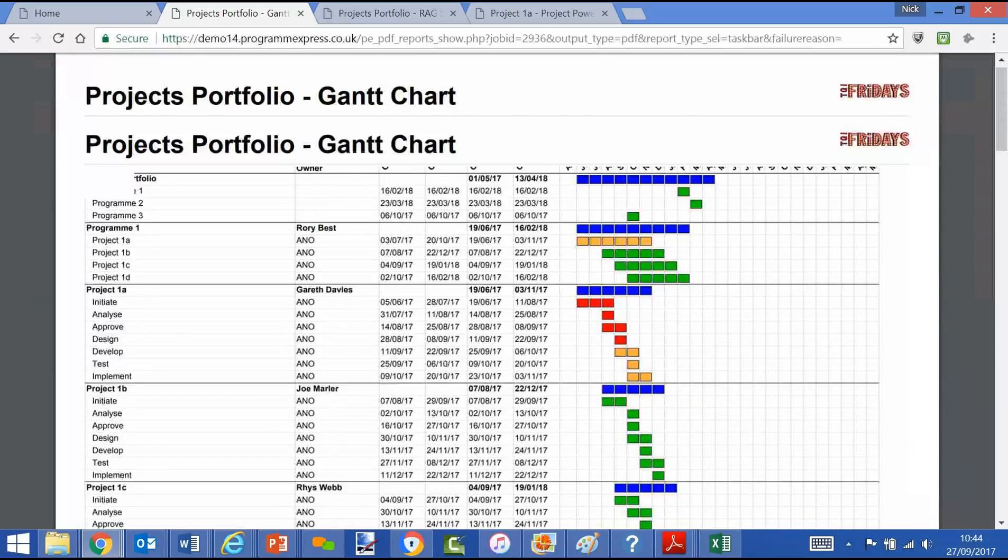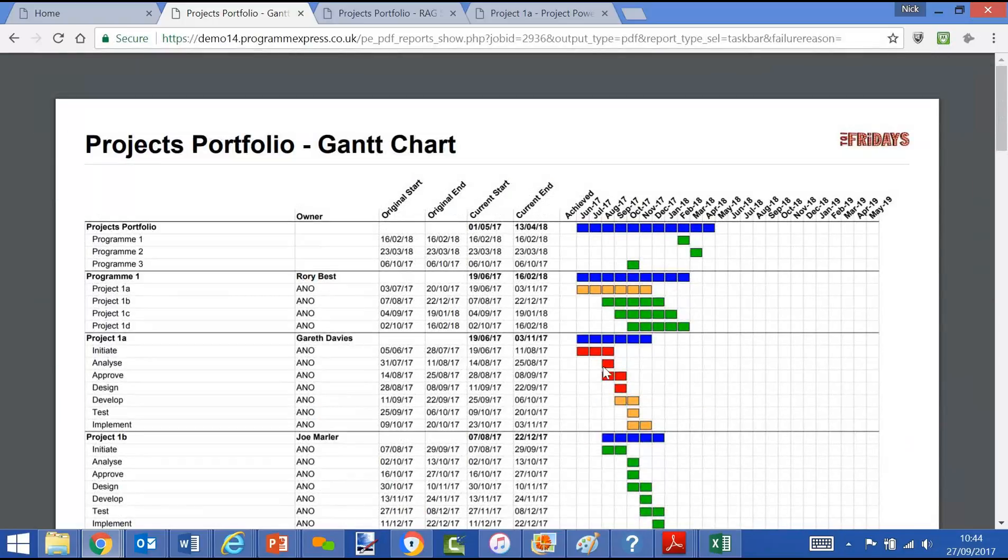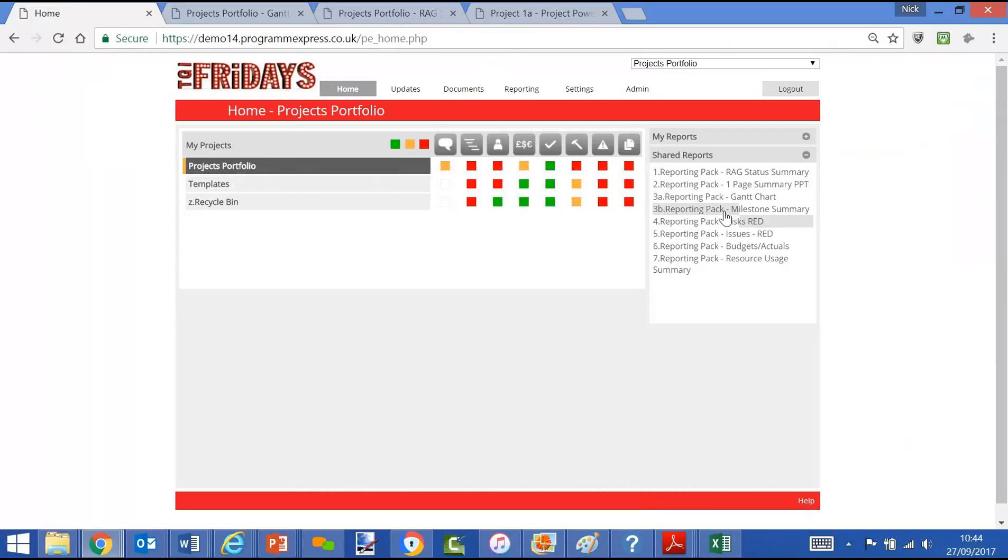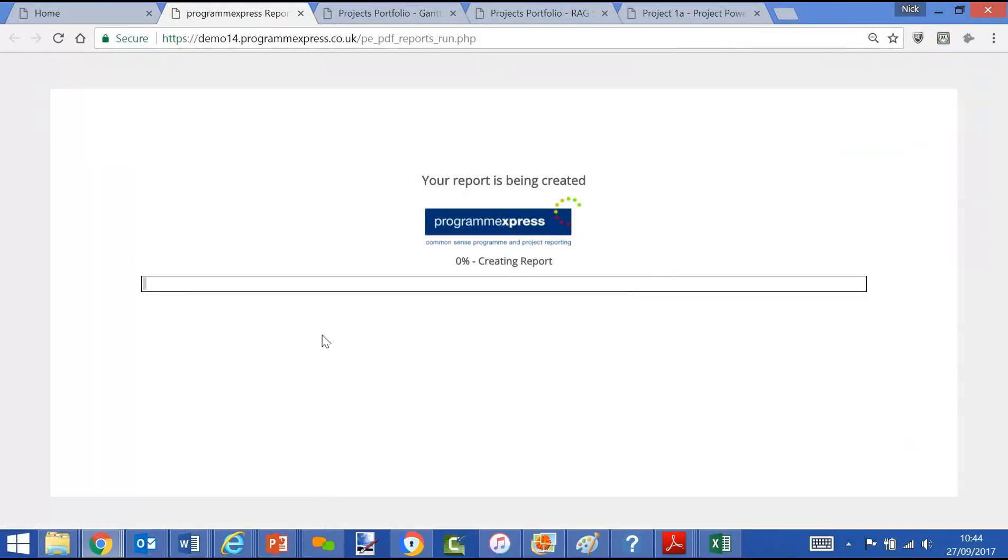We use the red, amber, green methodology for our task bars. Red meaning missed and amber meaning forecast to be later than expected. We're using the same data, different view. The milestone summary view, so this will be timeline milestones on a row per project, higher level view.